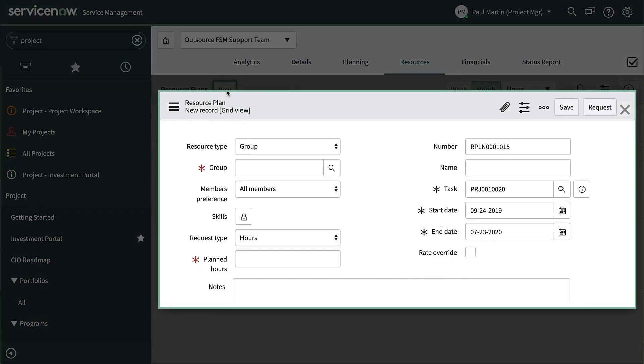For example, does the project need a developer, customer researcher, or both? How many? And when is the start and end date for each resource?